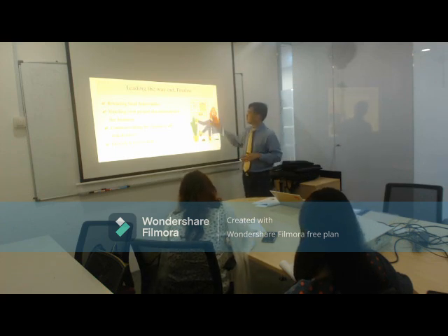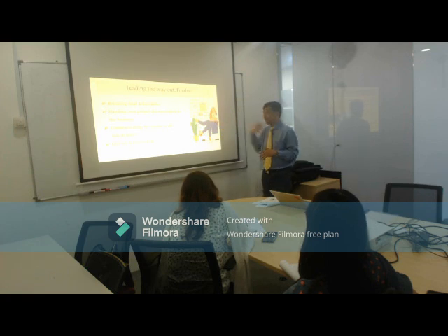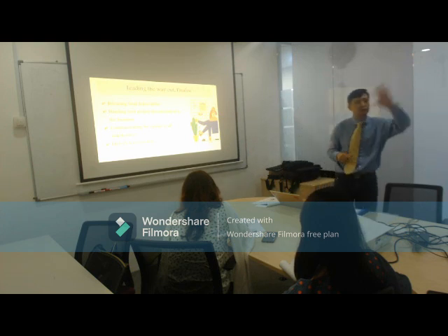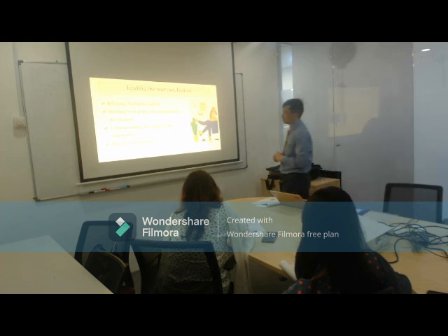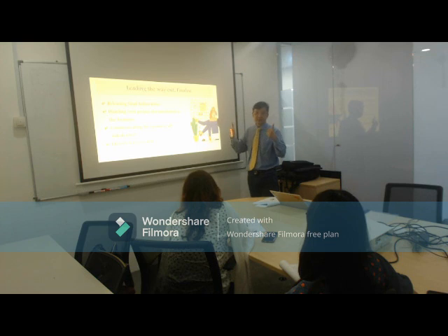So that's why it's important that you need to communicate to all, and my project manager to come back to me to tell me to come, check and see all done. To just confirm everything done. So project manager will take me by my hand, check and see all these things all done, and say, can we confirm it's done? So when the management says that yes, we are done, then that is how we close the project.